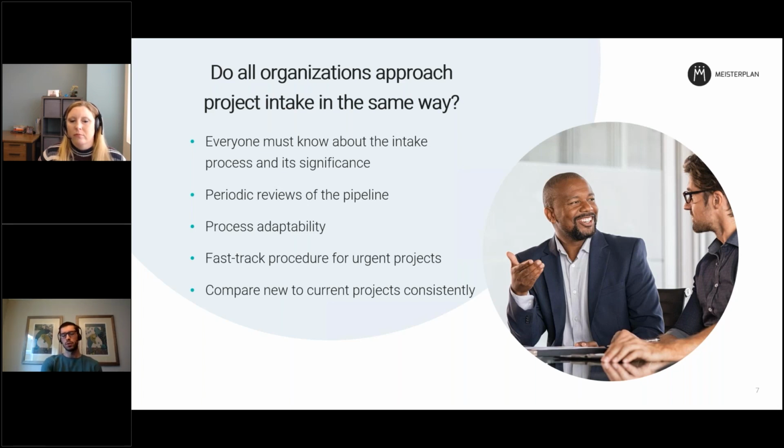Fourth, I want to highlight the need for prioritizing urgent projects. If a stakeholder doesn't know how to fast-track an initiative when necessary, then it's likely that they won't stick to the standard process and they will find a workaround. So in this case, it's important to have a clear and communicated fast-track procedure in place as part of the project intake process. Last, consistently comparing new and current projects is important to create a feasible scenario going forward, simply because we live in a world of continuously changing conditions.